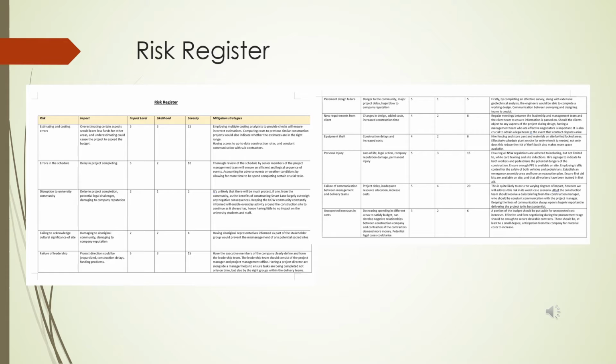The risk management plan is a process that involves many steps, the most important of which is that risk management should continue throughout the whole life cycle of the project. The first step is to identify each risk. It should be more extensive than simply naming the risk. The category and type of risk should be identified. Things like brainstorming and SWOT analysis are used to do this.